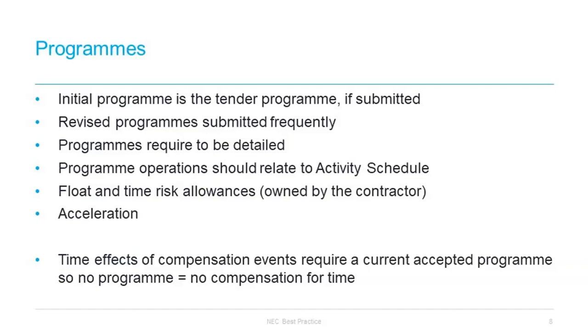When NEC contracts are amended and moved away from the NEC principles, there are times when acceleration can be forced on the contractor. And I would flag this. This is an area that's often amended. In those circumstances, perhaps a better way of thinking about acceleration is as a compensation event, where the contractor is essentially being told to do something. And although it might actually be an amended acceleration clause, it doesn't operate that way.